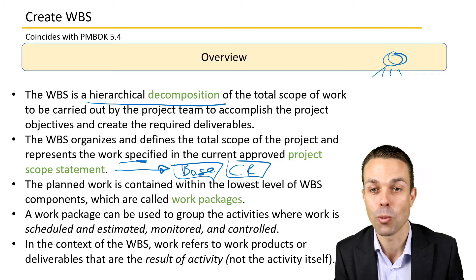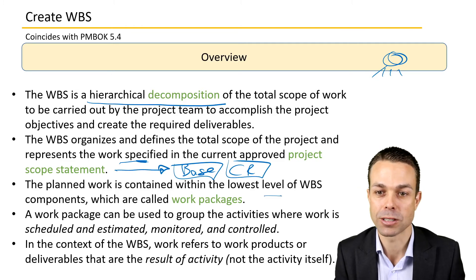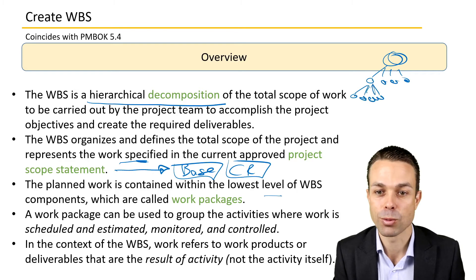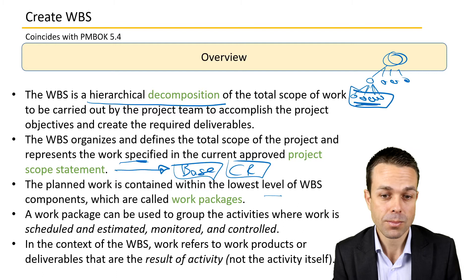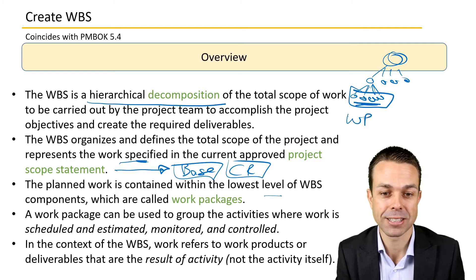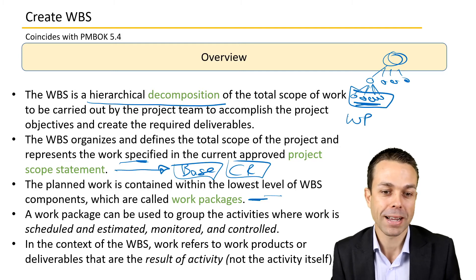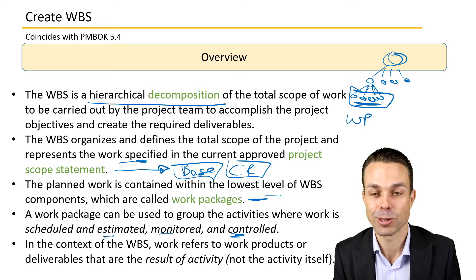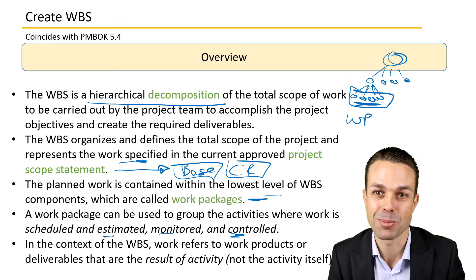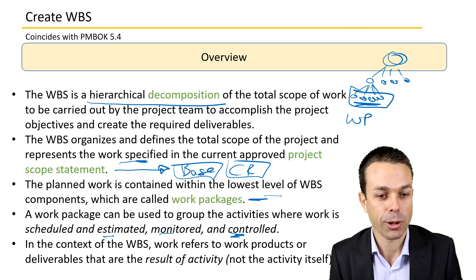Don't forget that the scope statement needs to go through a change request if we have a change once it's been baselined. The planned work is contained within the lowest level of the Work Breakdown Structure — we might break it down several levels, and the actual planned work sits at the lowest level. These are called work packages, which we'll be assigning to teams to complete. The work package can be used to group activities where work is scheduled, estimated, monitored, and controlled, feeding into all our other project management processes.